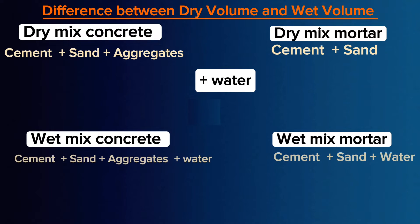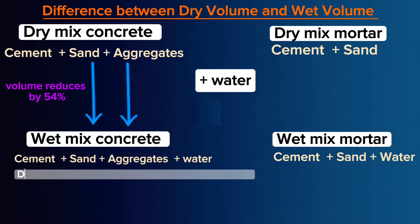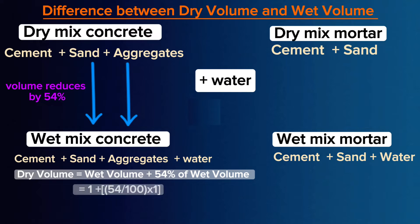When water is applied or added to a dry mix, the volume of the dry mix reduces by 54%, meaning dry volume is equal to wet volume plus 54% of wet volume, which can be simplified as 1.54.